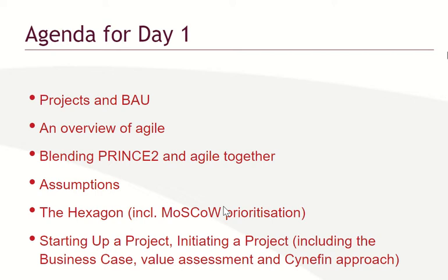Then should have. That means those things are not a must, but it is expected that they should be there. It's not a must, but it should be there. If there are 10 things under should have, and you are able to provide 7 or 8, the customer may be happy.